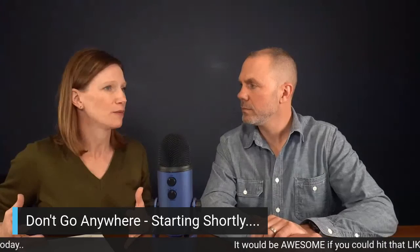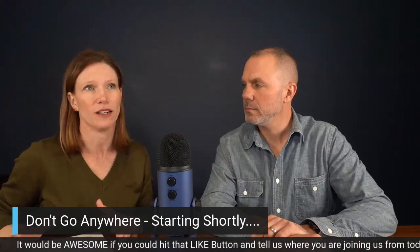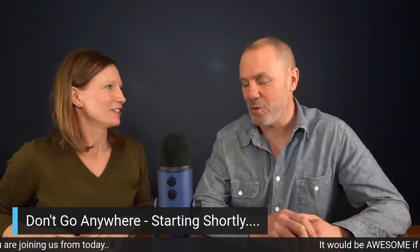Yeah. Because oftentimes when you don't start there, you design this beautiful home, which has this amazing walkout basement, only to find there's not enough grade. Right. It's a flat lot. You can't have a walkout. Well, you could, but it's a whole lot of work to have a walkout on a flat lot.